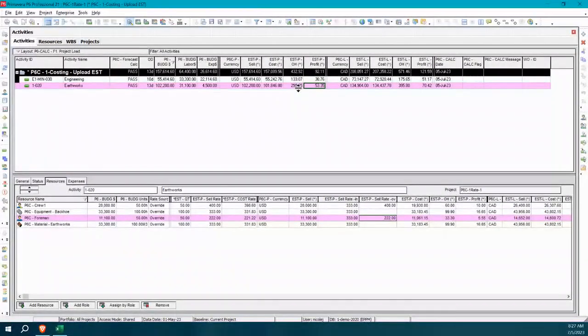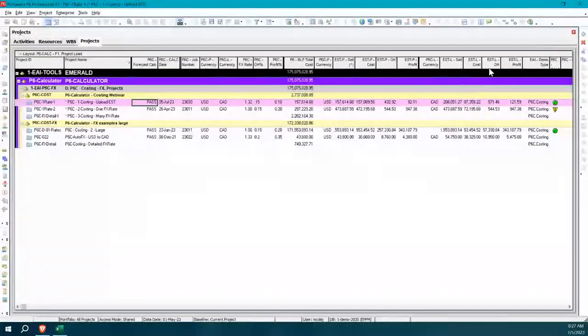It can be whatever you wish. But the idea is we're splitting the sell price to the cost, the overhead and profit. We're seeing that at both levels. We're bringing them together, and we're seeing the totals. And those totals can go all the way up to the project level. Okay, so we're seeing those reported to the top. So this gives you a lot of nice flexibility on how you slice and dice different costing.